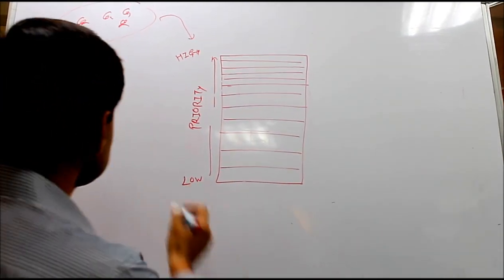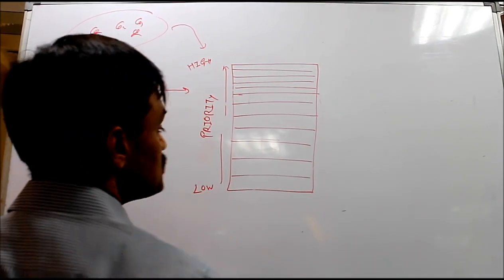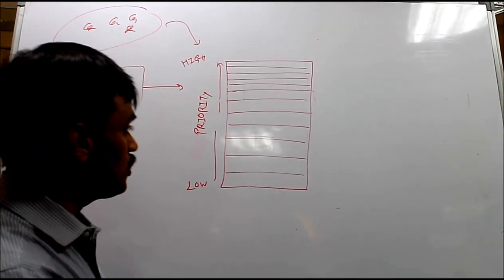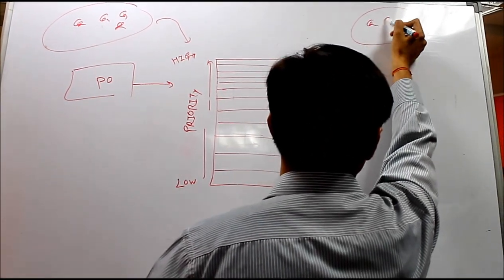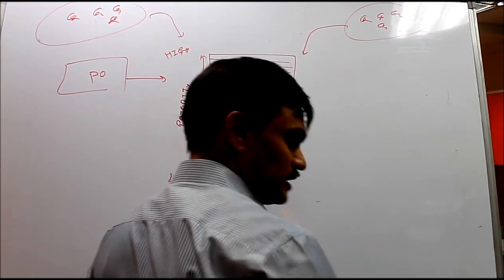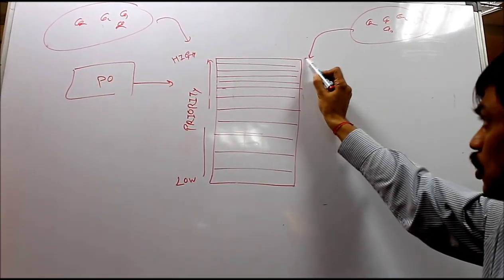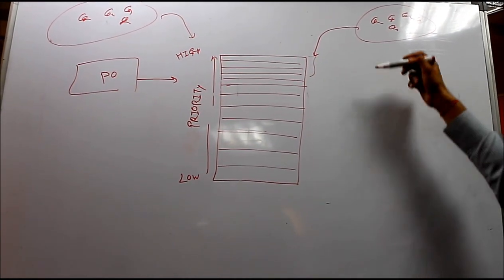upcoming sprints. Product owner. The product owner is the one who controls and manages the product backlog. He is the one who owns the product backlog. The Scrum team, the development team, looks at the product backlog in order to identify work for the upcoming sprint. They pick the top items from the product backlog and create their sprint backlog for their upcoming sprint.